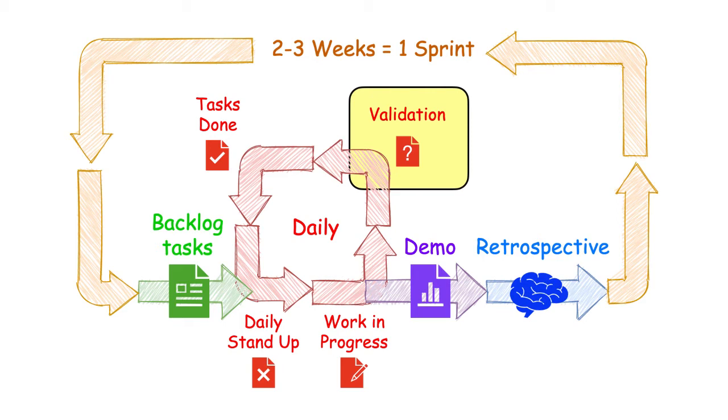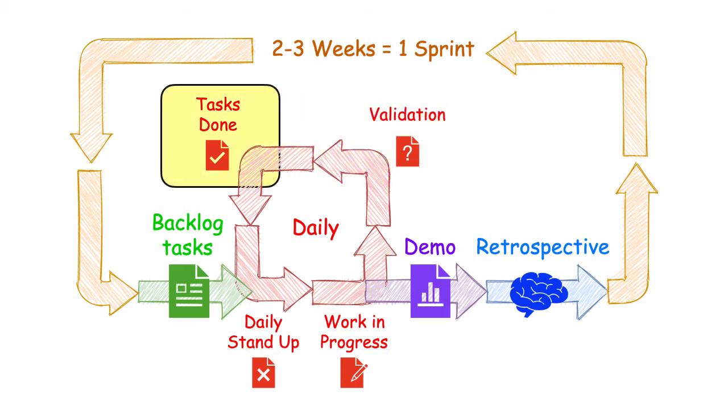Sometimes there's a self-assessment step. So I've done the task, but I need to compare it to a solution, or I need to do a step where I do a self-assessment. Essentially it needs some way to check that it meets the standards. And so something is not considered done until it has passed this validation step, and then we can move those tasks to done.